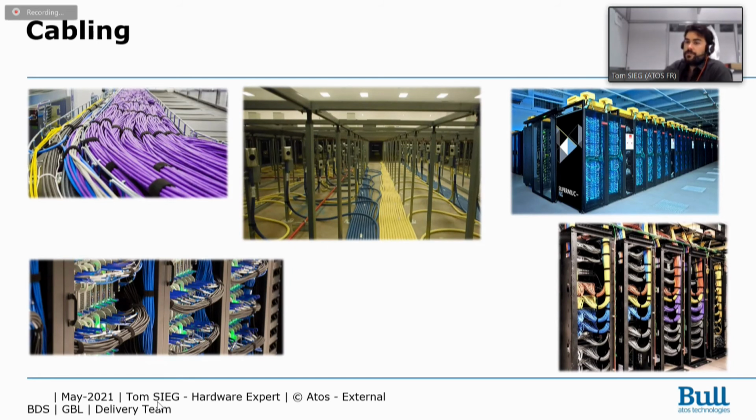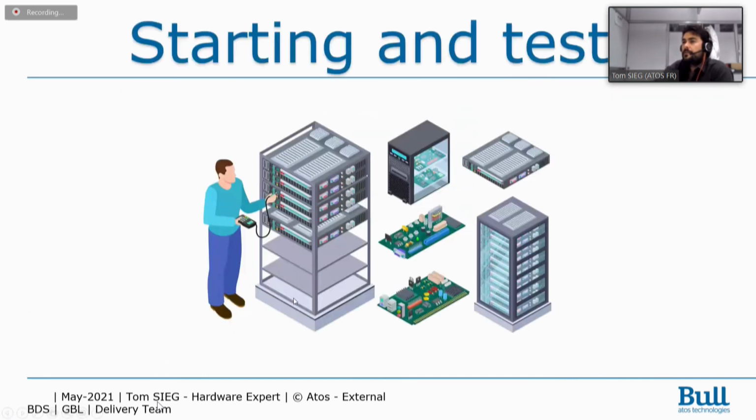During the installation of a cluster, it's the most time-consuming part. One server means 2, 3, or 4 connections, and you will easily have 2,000 connections for only 1,000 or 500 blades. So it's really the big time-consuming part of a cluster installation. We're going to the starting and tests.